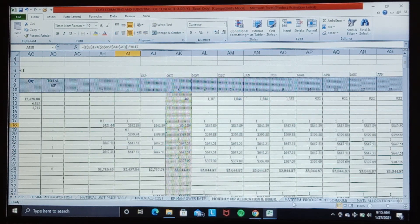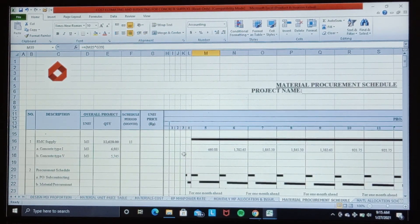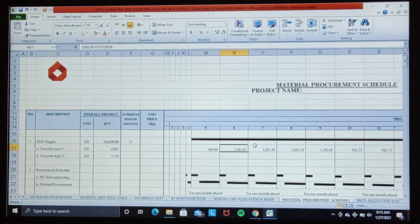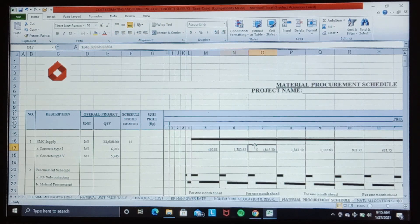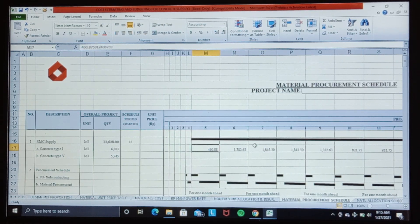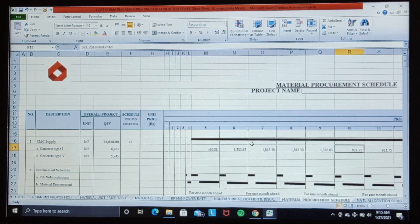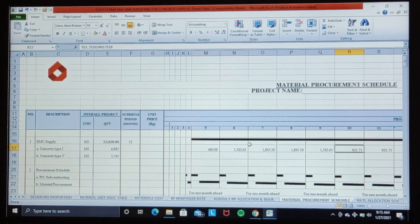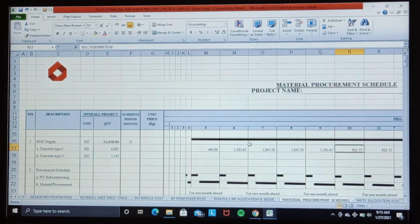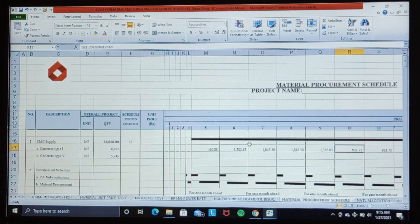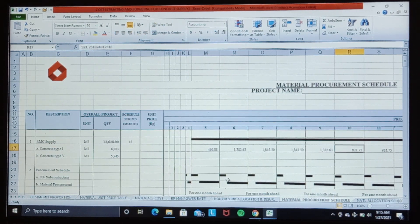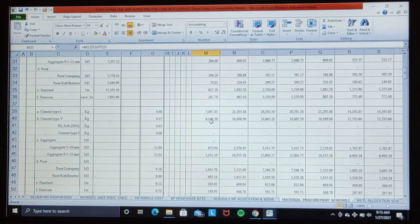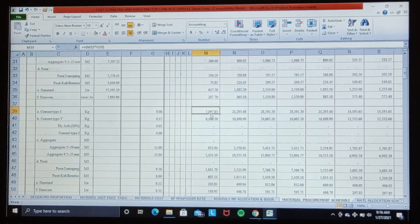Next we create material procurement schedule, referring to the concrete requirement schedule per month. This is the monthly concrete requirement schedule. The result of this calculation are obtained from the allocation of monthly concrete volume divided by the total concrete volume multiplied by the total material requirement as previously calculated in the material requirement calculation table, as well as the calculation of material cost according to the material requirement allocation.